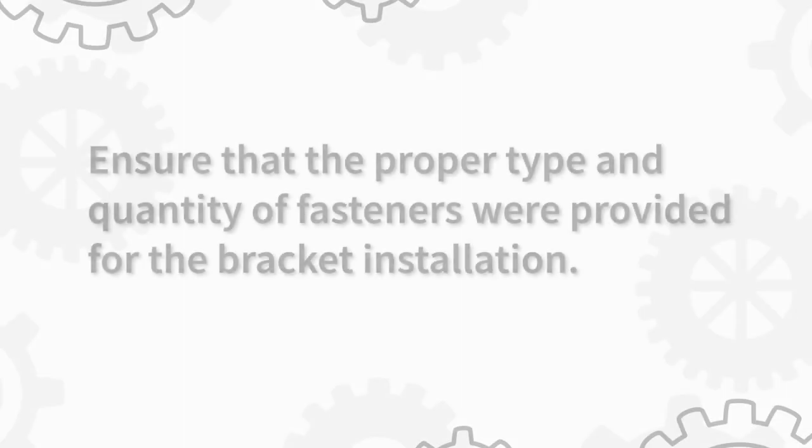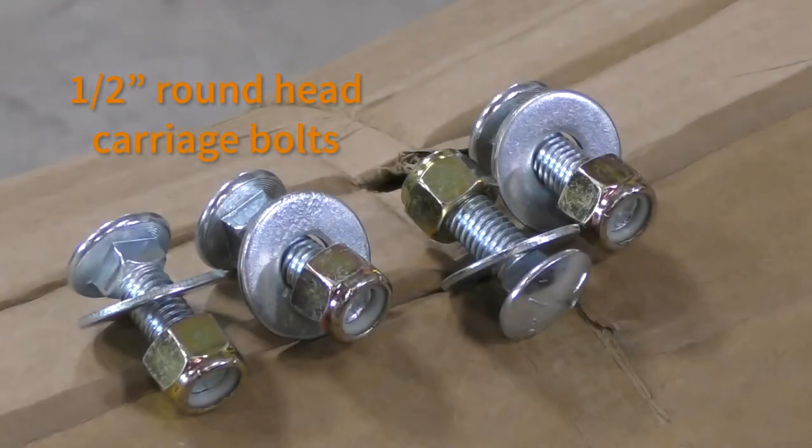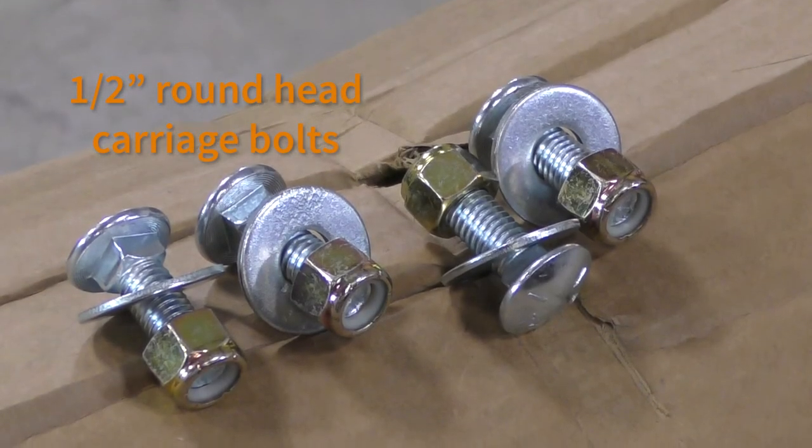Before hoisting the shaft into the guides, refer to the hardware sheet and ensure that the proper type and quantity of fasteners were provided for the bracket installation. For this install, we need half inch round head carriage bolts.